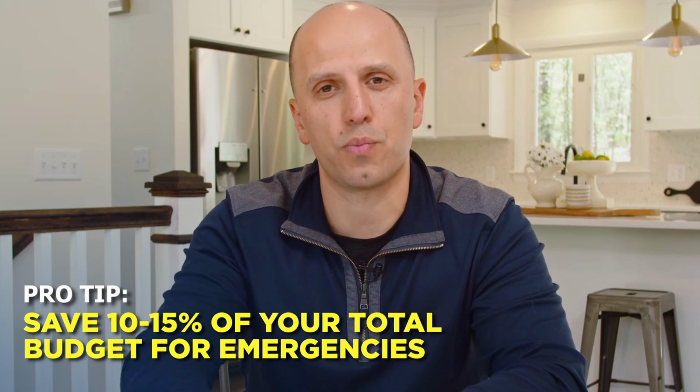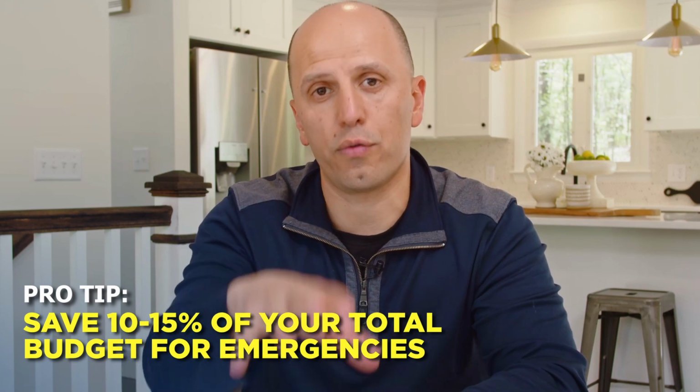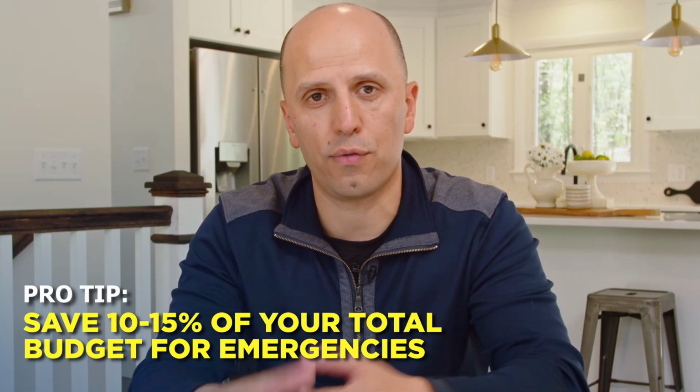And then you put a dollar amount to everything that you're doing. Because if I'm saying that I'm gonna fix the bathroom, I need to outline everything from demo to installing tile and everything. But once you finish the whole scope of work and budget, because we're always going over budget in this market, right? With labor going up and materials going up, you need to pretty much put about 10 or 15% of your total budget aside for anything unexpected. In this case, I told you guys I went from $100,000 in renovations to a final renovation cost of $150,000.